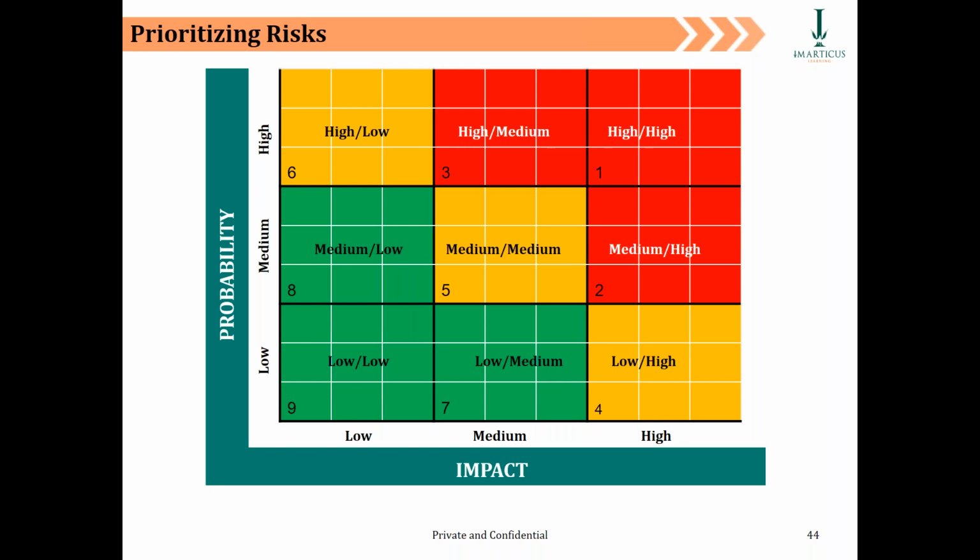And guys, this is the kind of slide which I want you to publish in all your projects, from henceforth. You can place here, for example, in the high, what is the risk? So write down that risk in that quadrant, write down the other risks in each quadrant, and show them that the amber or the yellow color risks can probably be contained. You need some help. Green is something which you don't have to worry about, but red are the ones which